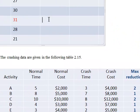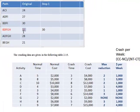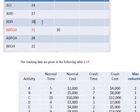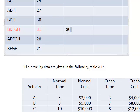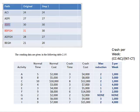But be very careful. If I crash H for three weeks, one of the paths would become 28, which is not correct because you're constrained by path BDFI. So you can only crash H for one week. Although it says you can crash it for three weeks, you're constrained by path BDFI and can only crash by one week. BDFI stays at 30 after you crash H by one week since there is no H in that path. There is an H in paths BDFGH and others.